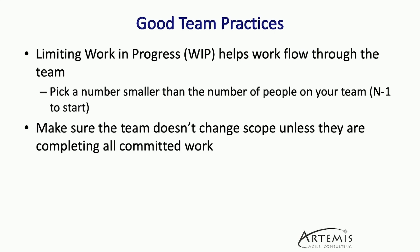Some good team practices to keep in mind. Number one: limiting your work in progress. That's going to help your workflow and help value flow to your customers. How to pick the initial starting point for your WIP limit is a bit controversial. Some teams have wanted to set it at two times N, where N is the number of people doing work — your devs and testers. But I would really focus on N minus one. This has two benefits: one person is a floater at any given point and can help out where needed; and two, it means people have to work together, leading to a lot of knowledge sharing, which is critical for getting into those performing and high-performing states on Tuckman's maturity model. N minus one may cause a ruckus because not everyone will have their own story, but challenge your team to think about how they could make it work.